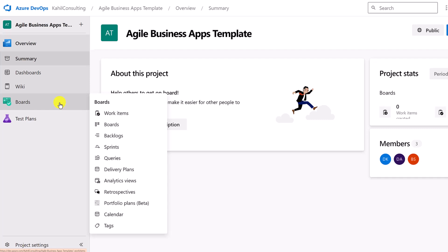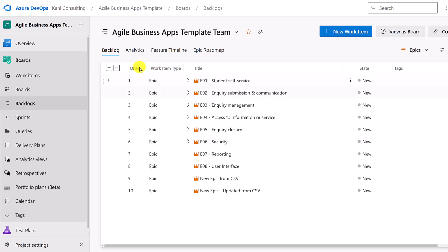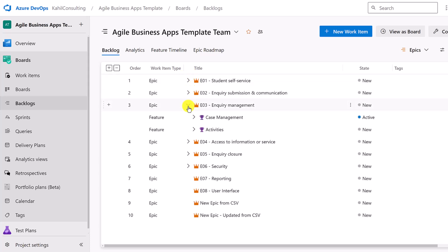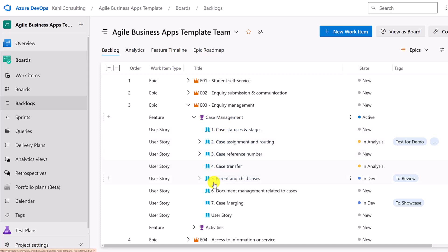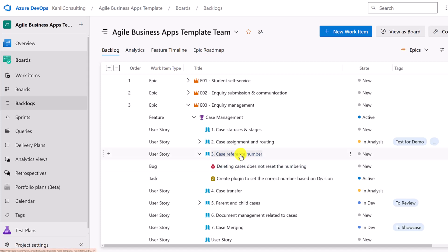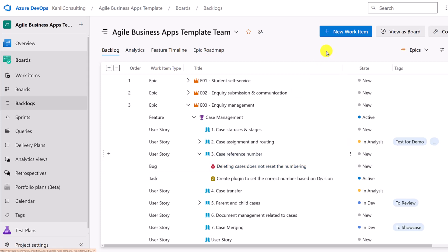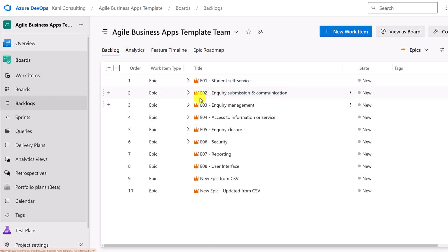Let me share a practical example of how that looks in Azure DevOps. I have a project with some work item types. If I go to my board and go to the backlog, you will see a backlog of items. Those are all my epics. If I open one of the epics, I can see my features and how they are organized — my epics on top, my features below. Then if I go to the feature for case management, I have my user stories. Opening a user story, I can see tasks in a specific state assigned to someone, and also a related bug assigned to that task.